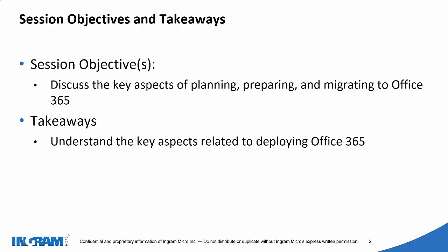This is a sample deployment schedule for a large enterprise with more than 500 users, where the estimated mailbox size would be about 2 to 3 GB. For that you will need almost 3 weeks for the complete environment